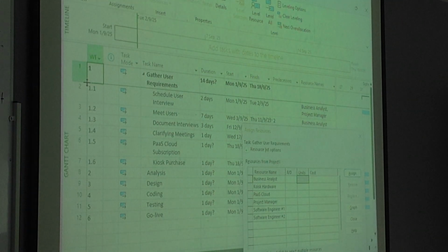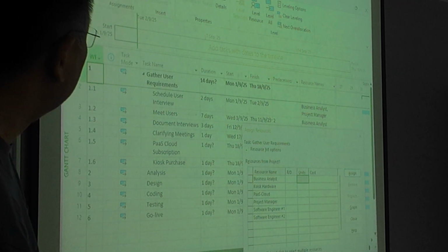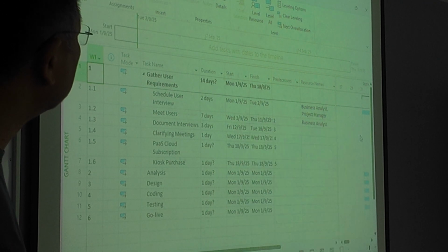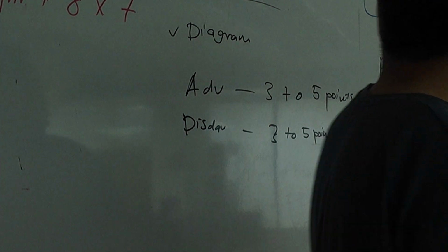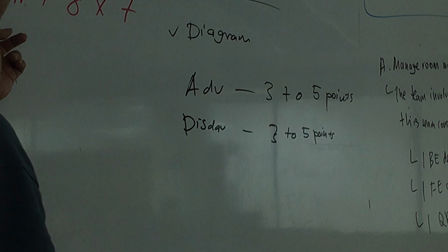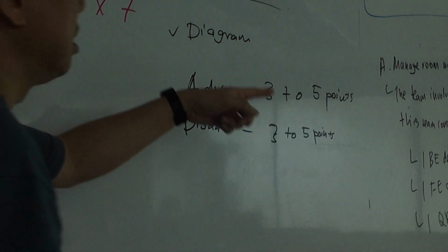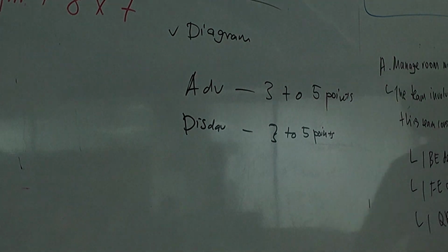8 hours, because this is an hour. To calculate how much a day, you must multiply 8 hours a day. Then you multiply by 7 days. Too lazy to do it in my head. So 50 times 8 times 7. And you get 2008. Okay? So that's how it calculates for you in Microsoft Project. Sorry, I think I selected the wrong one already. Yeah. So you go back there, you see 2008. So that's how it calculates it. $50 an hour, which you entered in the resource sheet, times 8 hours a day, times 7 days for this particular subtask 1.2. So if you change the number of days here, technically that should change.